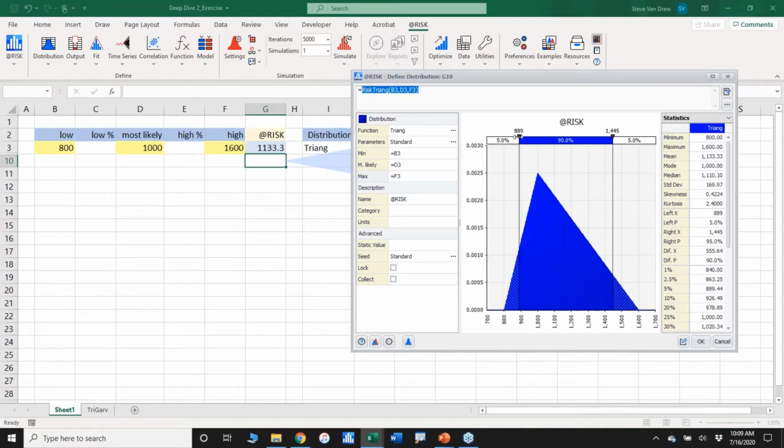You can see that it defaults to present the 5 and 95%, but I can move these around to wherever I want. I can go in and type that to be a 10% if you were interested. So @Risk lets you move them there. It lets you change the values; they're called handles. It lets you change these to go to wherever you want. Okay, so I can see that there's a 1.6% chance in this specified triangular distribution of being at or below 850. I can come over here to the 1450. I make that a 1450 and it tells me 4.7%.